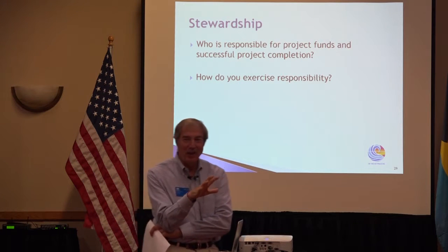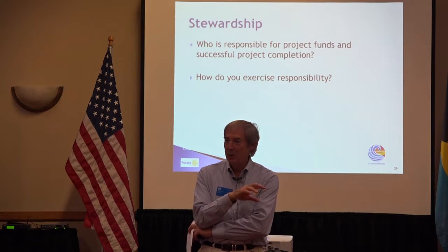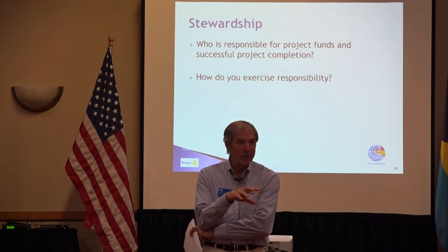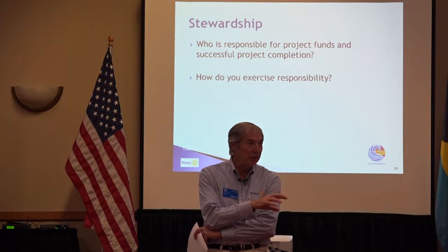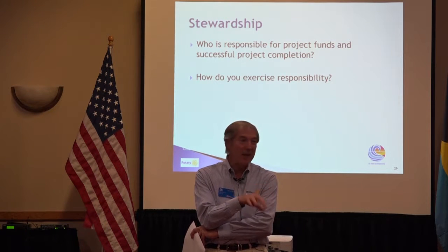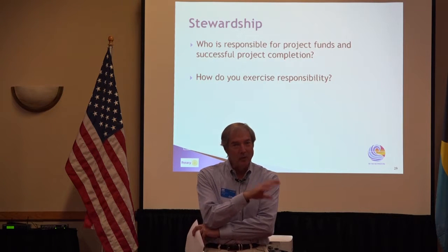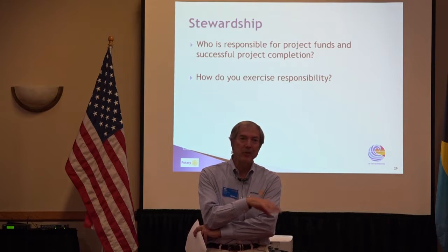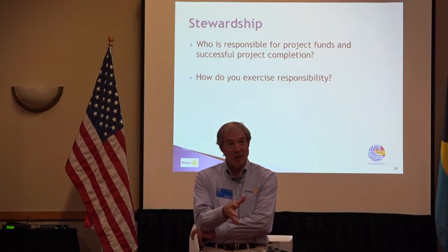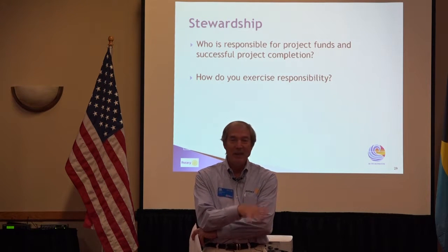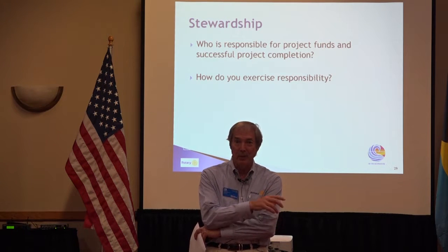So a cadre person is somebody who knows a technology and knows a region, and they will go and work with projects in those places. If you're doing a water project in Ghana, there is probably a cadre person in West Africa that would go there and look at your project and talk to the partners and see if you got all the right pieces in place, make some suggestions early, and at the end of the project, they might come back and make sure everything is working okay. If it's big enough, they will be required to do that by the Rotary Foundation.